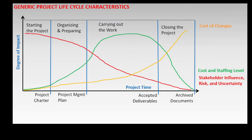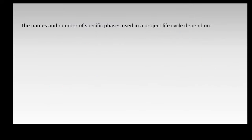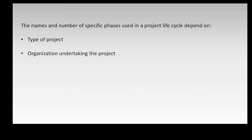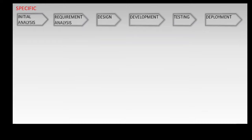Note that the generic phase of carrying out the work consumes most of the funds and time during the project. The generic phases can be divided into more specific phases. The names and numbers of the specific phases used in the project life cycle depend on the type of project, the organization undertaking the project, and the expected outcome of the project.